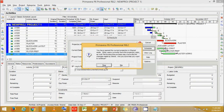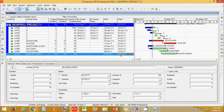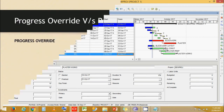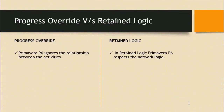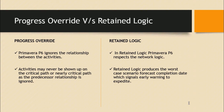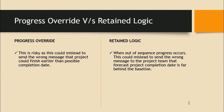If we schedule again on Progress Override, the end duration remains the same. In summary, Primavera ignores the relationship between activities in Progress Override, while in Retain Logic it respects the network logic. In Progress Override, activities might never show up on the critical path since predecessor relationships are ignored. In Retain Logic, it creates a worst-case scenario completion date, giving early warning signs to expedite delayed work. Progress Override could give a misleading message that the project is finishing ahead of schedule.